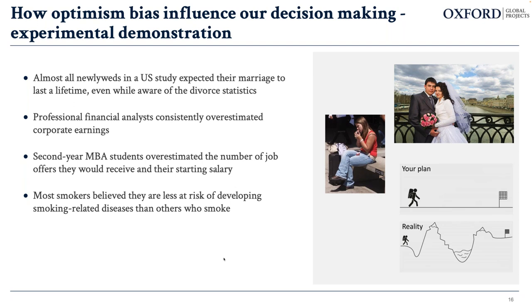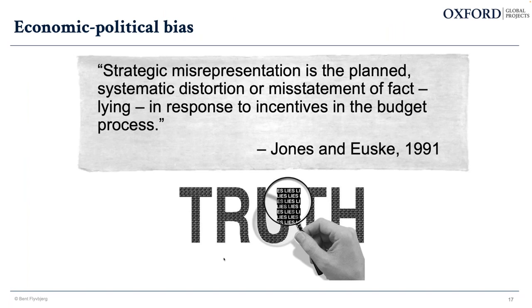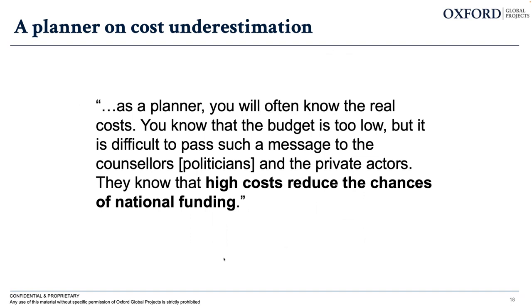The other behavioral bias that I listed was the economic-political bias. And here we're specifically looking at strategic misrepresentation, which is the planned systematic distortion or misstatement of fact, i.e. lying, in response to incentives in the budget process. So really, this is like one of the many planners we have talked to over many years, saying that we know that this is not the real cost.